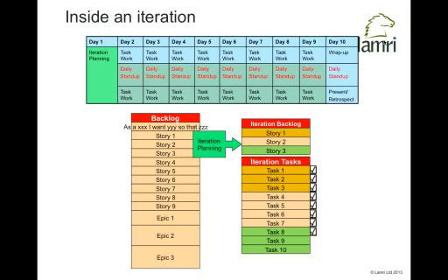We've actually achieved all the tasks from story 1, all the tasks from story 2, and one of the tasks from story 3. So what's that actually mean? Yeah, and we've failed to do tasks 9 and 10. So what's that mean? It means we haven't delivered story 3. So in this iteration, we've just managed to deliver story 1 and story 2, and we've failed to deliver story 3. So what happens then?